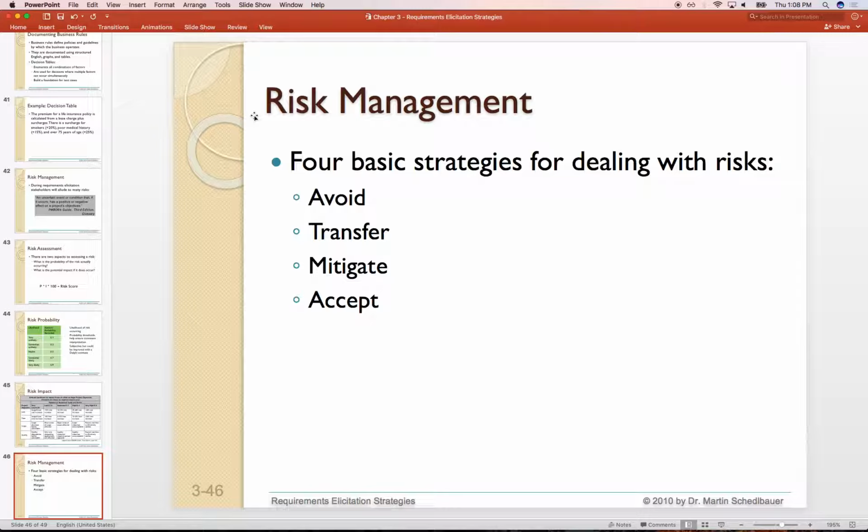And anything in between. I could transfer the risk, so that it's not me bearing the risk. I could transfer that to the vendor, perhaps, or I can transfer it to my provider, so that yes, it can happen, but it's not me who is going to be impacted. It's going to be you. So I can transfer that risk to someone else, or mitigate, and say, okay, I'm going to accept that it will happen, and if it does happen, I'll deal with it when it happens.